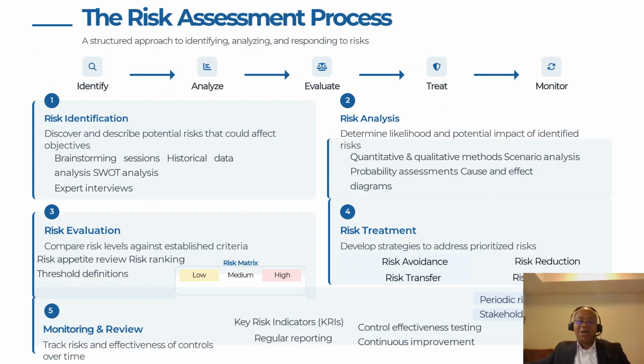Now, to assess this risk, there is a process, there is a workflow, because risk assessment usually encompasses three major steps. You identify, you analyze, evaluate, then you propose solutions, and you monitor to ensure that the solutions you are implementing are operational or they are useful.